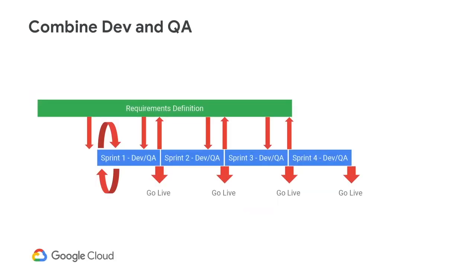The first important tactic to avoid scrum fall is to merge development and QA into one sprint. This likely means you will take on less work in the sprint to give time for bug fixing. But with testing and fixing merged into the sprint, you have tested and ready-to-release functionality at the end of each sprint — this gives us the real ability to pivot.